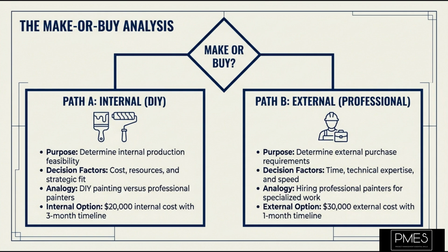Let us consider Sarah, a project manager developing a new mobile application. Her internal development team excels at user interface design but lacks specific expertise in secure payment gateway integration. Sarah performs a make or buy analysis. She estimates that training her team would take 3 months and cost $20,000, delaying the project significantly. Outsourcing it to a specialist vendor, however, would take 1 month and cost $30,000.